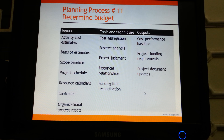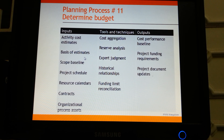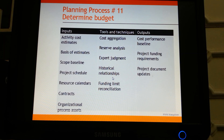Once costs are estimated, that becomes the baseline and then the budget. For determining budget, the inputs include activity cost estimates, basis of estimates, scope baseline, project schedule, resource calendars, contracts, and organizational process assets. The tools and techniques include cost aggregation, reserve analysis, expert judgment, and historical relationships based on historical data.